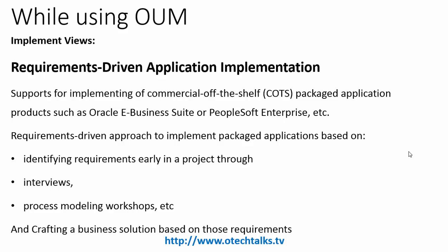A key differentiator in OUM is the requirements-driven application implementation view, important when using Oracle E-Business Suite projects. This approach identifies requirements early in the project through interviews, process modeling, and workshops, then crafts a business solution based on those requirements. This strategy can lead to more requirements and more customization, giving users opportunity to express all their needs.